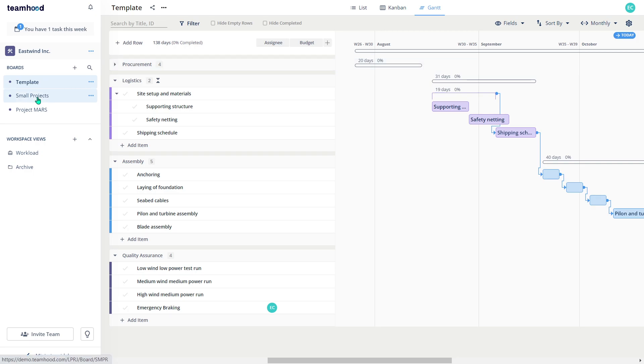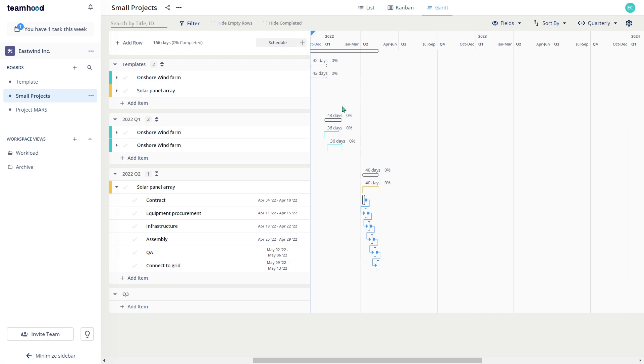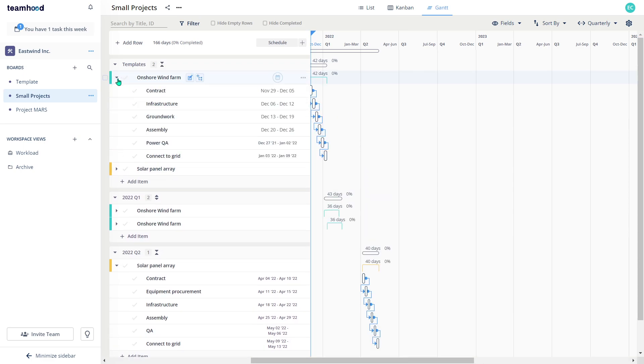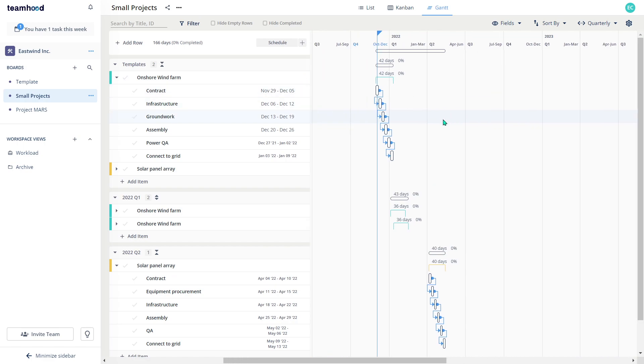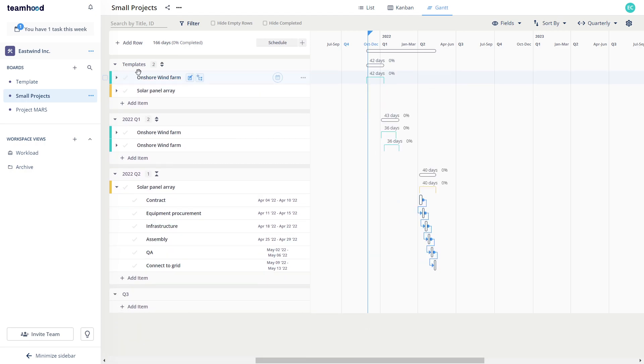Now, if I'm working on smaller projects, let's say you have from 50 to 100 projects happening every quarter or every half a year, then I would recommend going into each project as a standalone work item or a task. Because in Teamhood you can create quite a deep-nested hierarchy: subtasks, subtasks of subtasks, and so on. So you will be able to map out your project still with this structure. And it's better that way because in this example, I have a better structure which can be fit for numerous projects in one board.